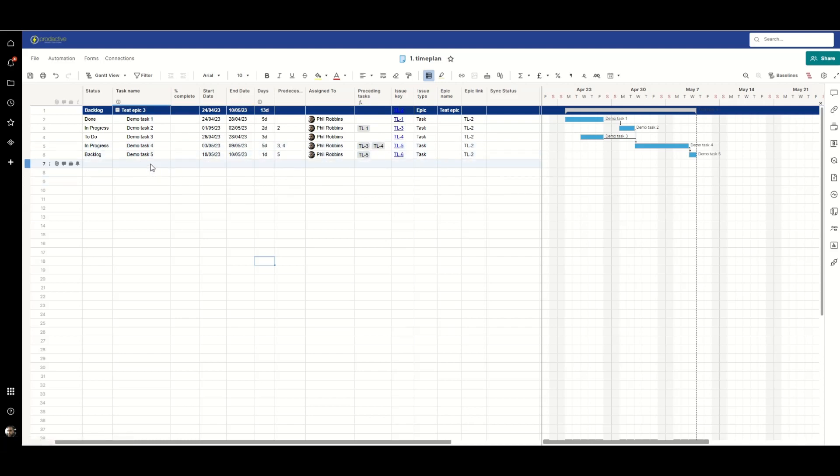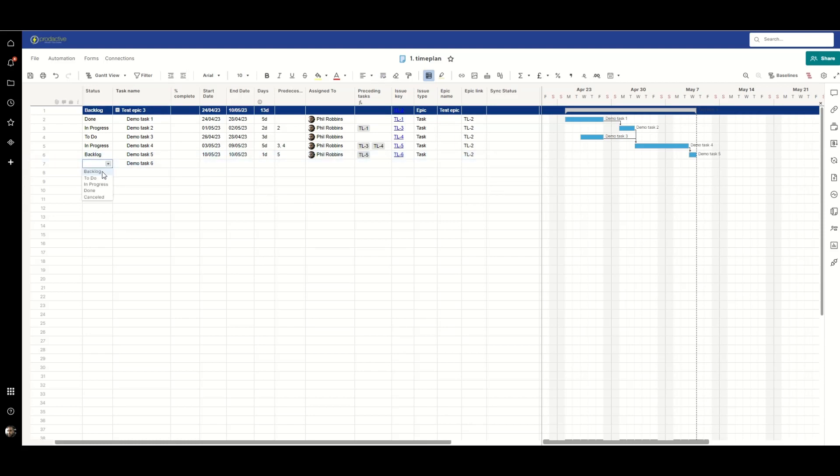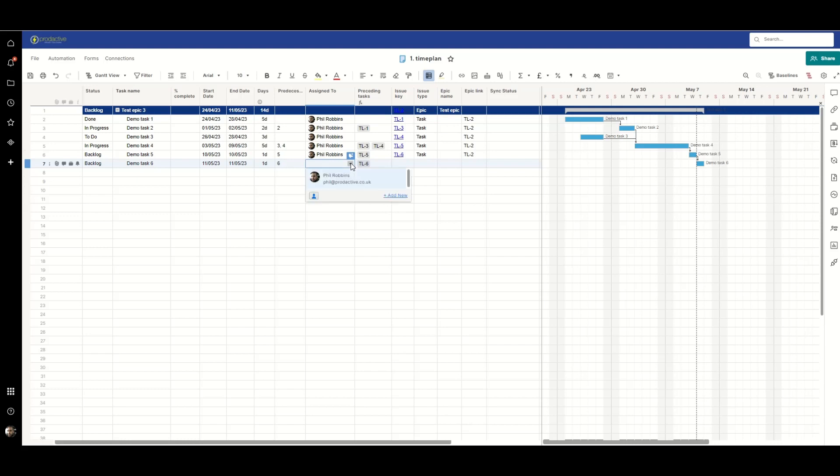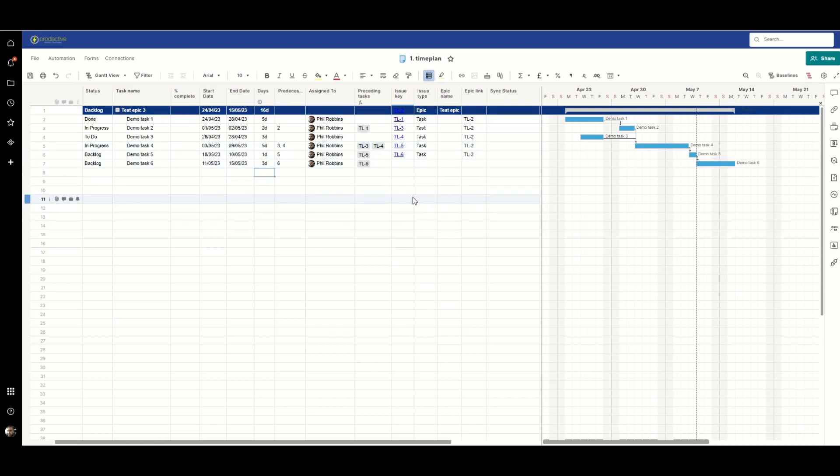Now if I wanted to create a new task in here, all I need to do is go put demo task 6. Let's say I'm going to put it into the backlog which is the logical place for it to start. I want to make row 6 its predecessor, I'm going to assign it to myself and maybe we'll give it a duration just for a variety of three days so you can see that's all going through nicely into the Gantt view.